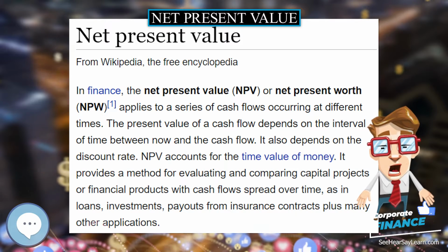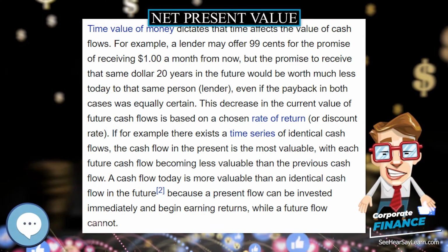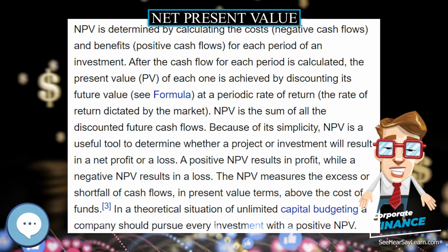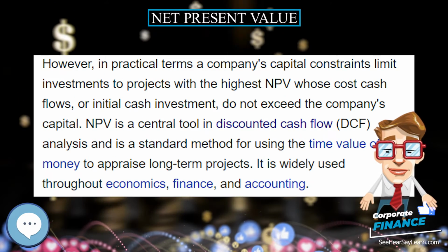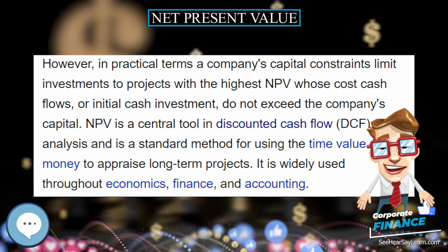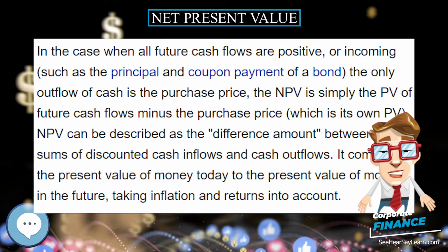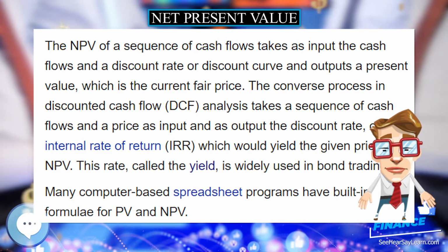Related to this concept is to use the firm's reinvestment rate. Reinvestment rate can be defined as the rate of return for the firm's investments on average. When analyzing projects in a capital-constrained environment, it may be appropriate to use the reinvestment rate rather than the firm's weighted average cost of capital as the discount factor. It reflects opportunity cost of investment, rather than the possibly lower cost of capital.